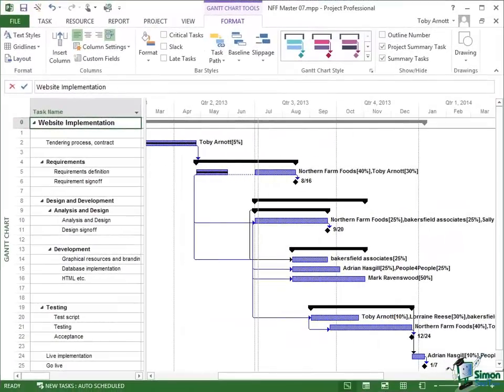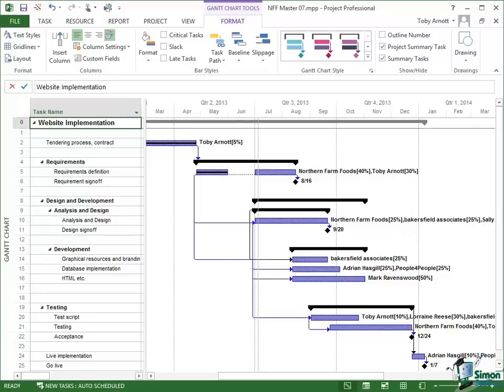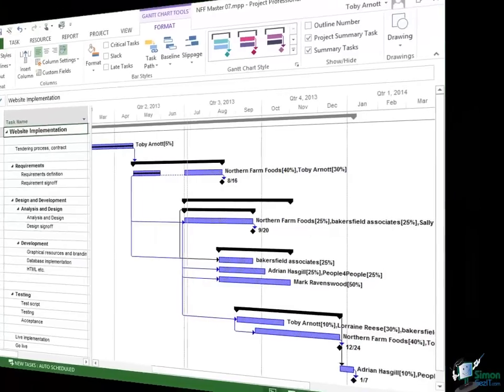The third requirement is that earned value analysis does depend on you having done some of the work on the project. It's basically comparing what has happened with what should have happened. So it's only going to have any value at all when you've actually recorded that something has happened.